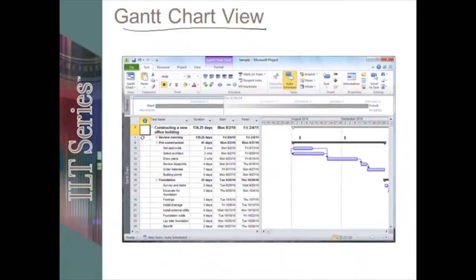Once you're all done with the plan and you commit the plan, you want to start really dealing with monitoring and adjusting and tracking. We do this by setting a baseline. The baseline copies what we're currently planning into basically what's called a plan date or a base date, so that baseline gives us something to compare to. We then start adding in actuals, we track any variance that's happening, and from there you might have to adjust the schedule. There's also a lot of reports available in project — this is where you start working with the reports, printing with reports, and of course there's a lot of communication with the team. Your default view is always Gantt chart view.